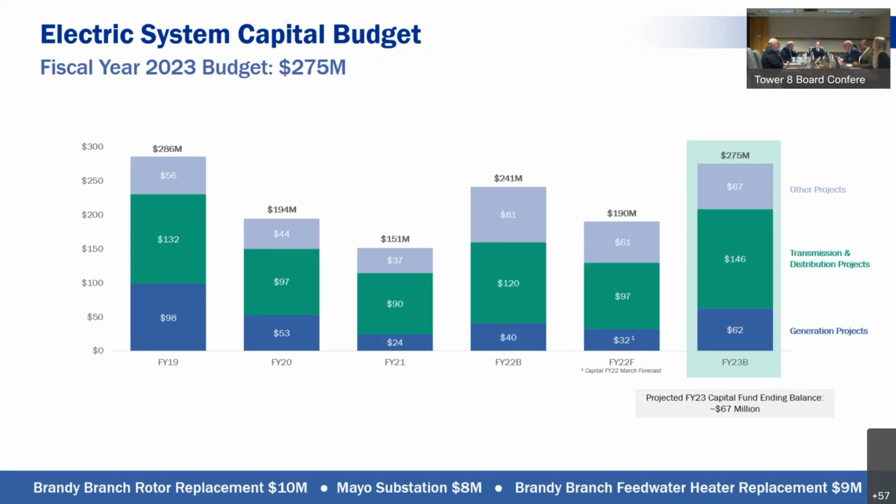So the capital budget, how is inflation, and how are you adjusting for inflation on these projects? Really on a project by project basis, as the folks in operations are working on those forecasts. That's a struggle that they're having, but they're looking at the bids that are coming in on current projects and making adjustments to those bids as they go, and are doing the best they can in forecasting what it's going to cost. And are we delaying projects?